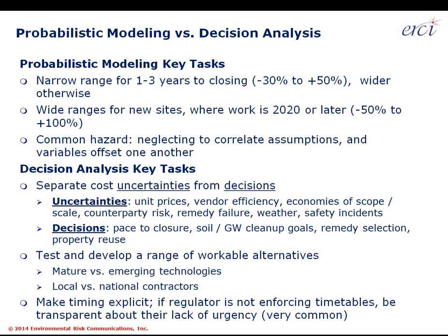Very robust, wide ranges. So again, if a Fortune 500 client is talking to a consultant and asking the right questions, communicating, in other words, the expectation that the range should not be plus or minus a contingency of 25%, which is fairly standard for a bid, but instead should be basically a comprehensive life cycle cost forecast, allowing for forgiveness and allowing for negative outcomes.